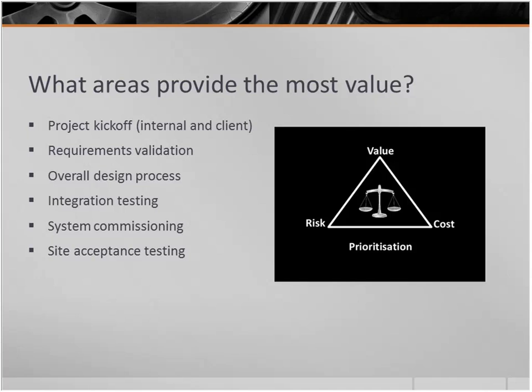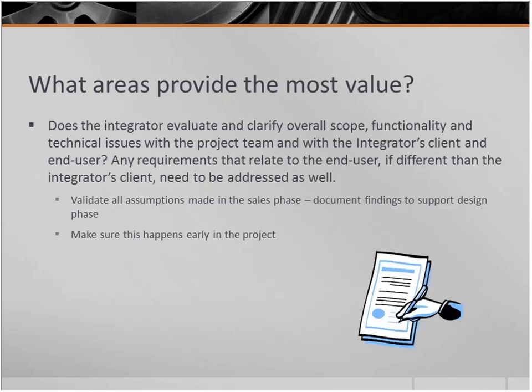And then system commissioning. Everybody does system commissioning, but what I'm talking about here is how you document the plan for doing your checkout, commissioning, and startup. I now have two startup managers, who are Interstates employees, and I put them on my large projects. They spend 3 to 4 months on site with the construction teams, making sure that we're ready for checkout, commissioning, and startup. Where it really saves us is in how many man hours we spend wasting time during checkout in particular, because we won't be on site if they're really not ready for us. So those are definitely some of the big areas that we saw the most value in.